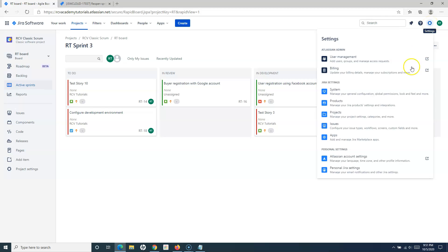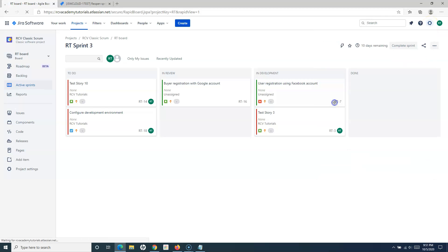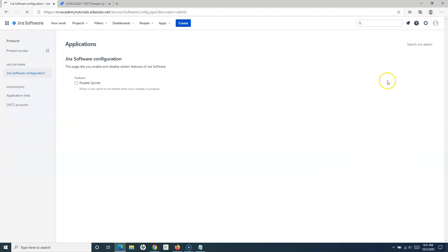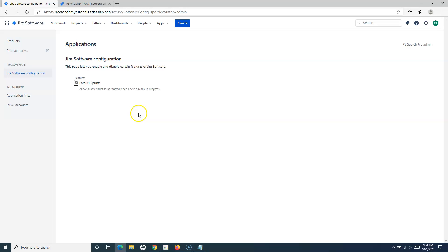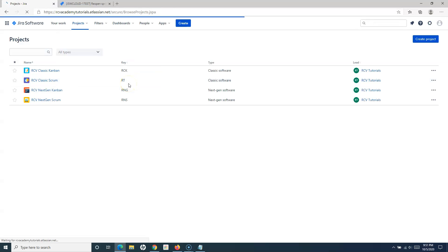To enable parallel sprints in Jira, go to Settings, then Products, and then go to Jira Software Configuration. As soon as you go there, you will see the 'Parallel Sprints' feature. Simply check that box, and this allows you to have two active sprints at the same time.